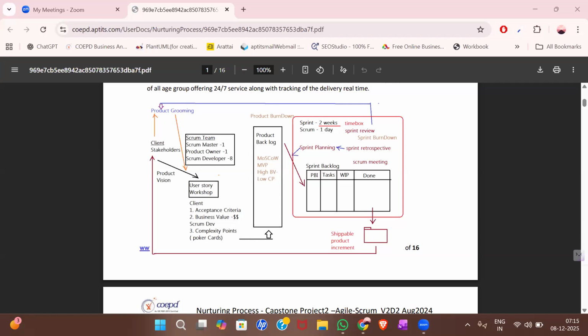And again we have CP and SP, story points or complexity points. These values will be given by the developers, and these will tell us how much effort is required to complete that user story. A user story is nothing but a piece of functionality, right? So how much effort a developer needs to complete that functionality can be estimated by this SP value, story points.